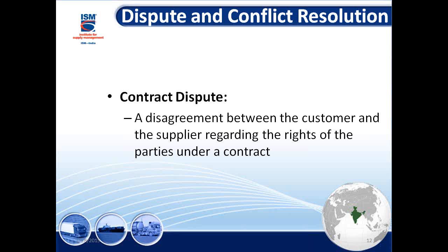Whether you use the word shall, will, or should, it makes a big legal difference. Shall is legally binding. Will means, no, I may go this way, I may go that way. So the wording, the way it is spelled out, is very meaningful. That's what you have to learn, how to write the contract.